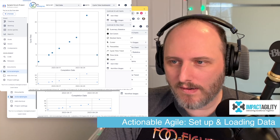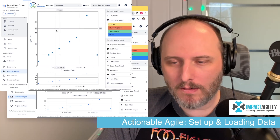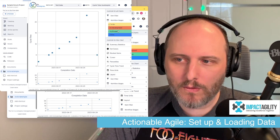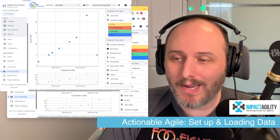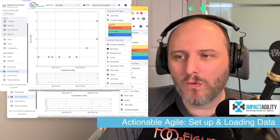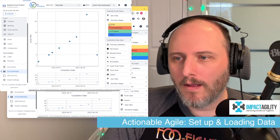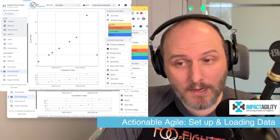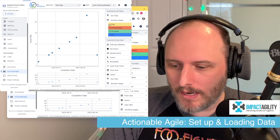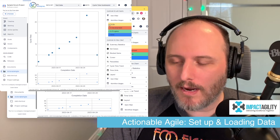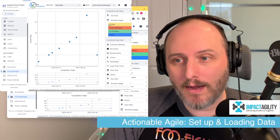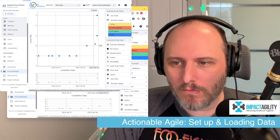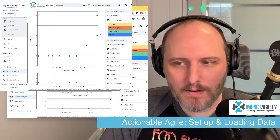First, open up the workflow stages. We're looking at the cycle time scatter plot. What I'm interested in is how long things take from the moment they go to In Development — from the moment we start working on them. I need to uncheck the To-Do stage here, because if I leave it checked it's going to start the clock from the minute a ticket was actually created, which isn't necessarily what we want to measure. For my purposes, I only want cycle time from the moment we start working on it, so I'm unchecking the To-Do workflow stage.